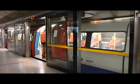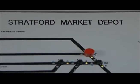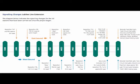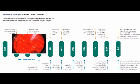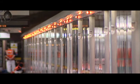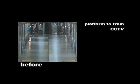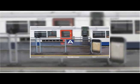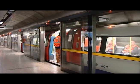Other changes needed for this project involve some alteration to signalling and operational rules, particularly at depots and holding roads. For example, this includes the resighting of some signals, stopping chevrons and diamonds, and changes to depot train movement procedures. Other changes that affect stations include platform edge door operation, platform to train CCTV equipment, and platform ATO communicator loops. Also, some platform end barriers will need to be moved. Again, specific details of these will be communicated to those who need to know.